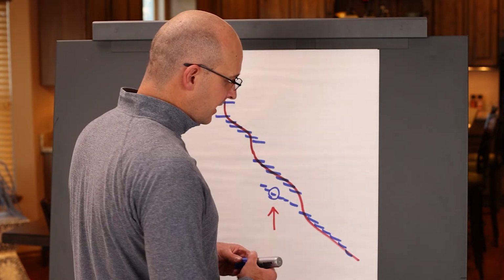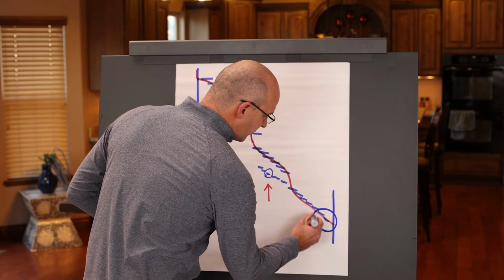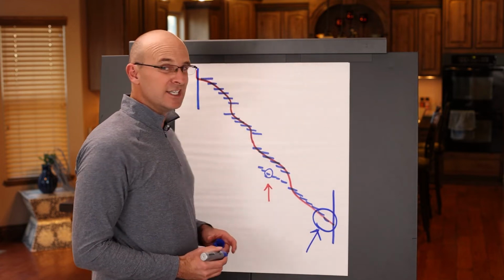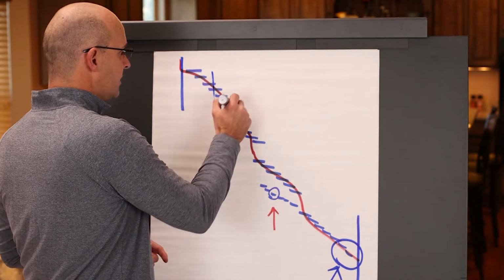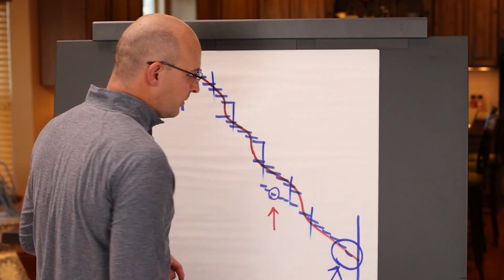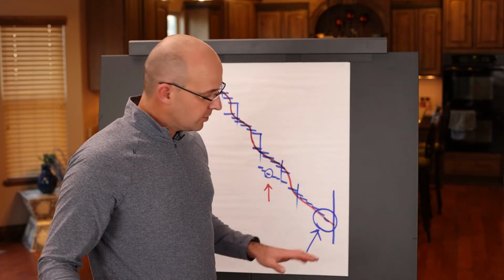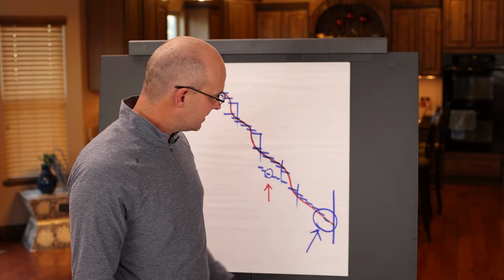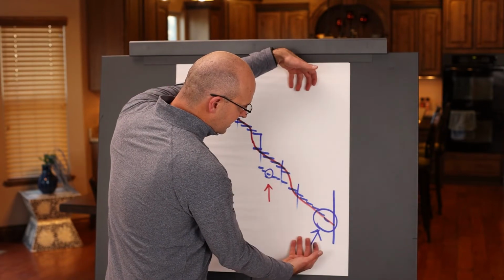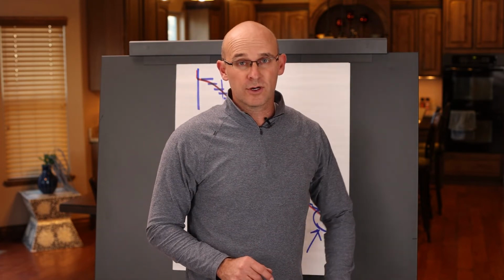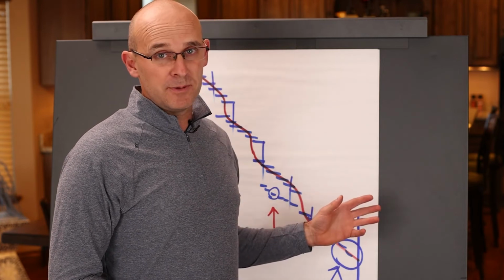The other thing I want you to be careful of is that if you have a longest path on your project and you don't have float here at the end, meaning contingency built into the schedule, you're in trouble, because you know that there's going to be points along this sequence where there's going to be delays, interruptions, roadblocks. And if you do not have some float at the end of the schedule, you're going to start condensing these activities and stacking them vertically, which is going to hurt workers and make workers pay for the sins of a failed project.